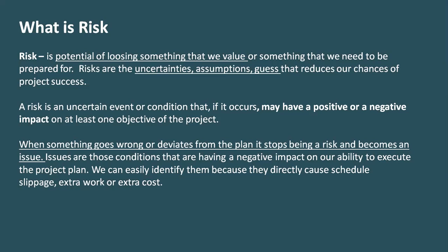But when we launched that particular laptop, we anticipated the demand will be for 1,000 laptops, but we had a risk. We thought the risk will be 10% deviation from the demand. So we had produced 1,100 laptops, 10% more, because that was the deviation. But we see that demand was so high that we needed to manufacture 2,000 laptops. That was a risk, right?